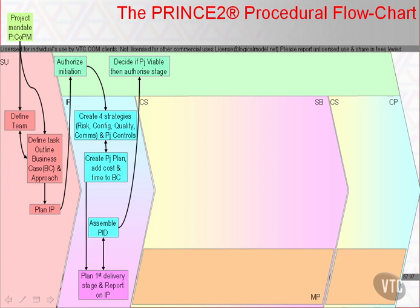We saw just now how the mandate triggers starting up a project, and if authorised, we then perform the activities of the initiation stage. The initiation stage results in the production of a decision support package called the Project Initiation Document, or PID, as described in Appendix A, Template A20. PID is a collection of many elements, like the A1 Benefits Review Plan, and is accompanied by things like the A9 End Stage Report and the A16 Next Stage Plan.